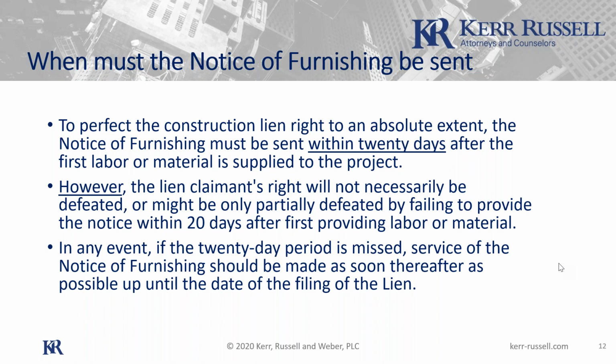And the reason that it's only a yellow light is your failure to provide a notice of furnishing only defeats your lien. And it can defeat your lien. If you're remote and you didn't do the notice of furnishing, that's kind of what the concern is, that your lien rights will be negatively impacted, maybe even lost. But what I want to say about that is the only way your lien is defeated for failure to provide a notice of furnishing is if in the meantime the owner has paid pursuant to sworn statements.